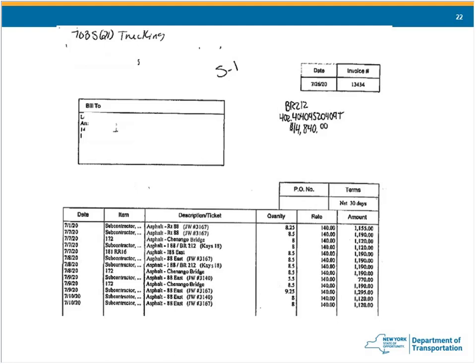Now, again, folks, this was an older example. And as we discussed previously, if you have approved subcontractors for trucking, they may not be included as services on agreed prices or force account work. All approved subcontractors, regardless of what type of work they are doing, need to be represented properly on MERC 27 for agreed price work or on the force account sheets as a subcontractor. These invoices with hourly rates are not acceptable for approved subcontractors.